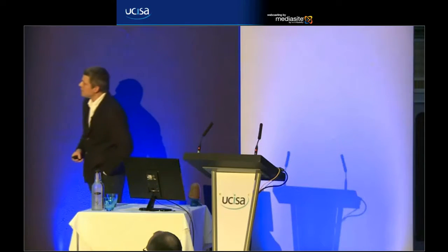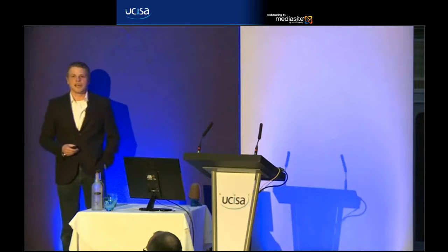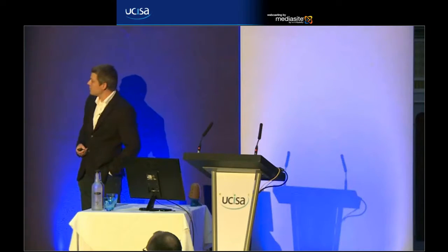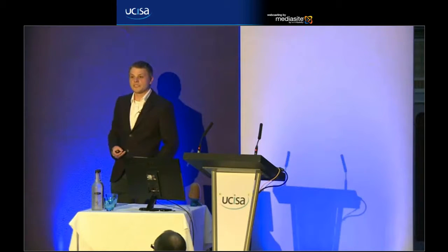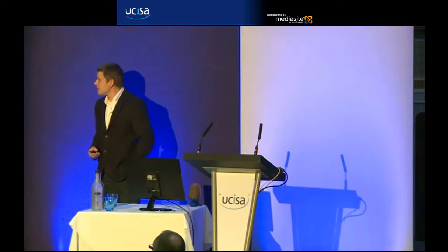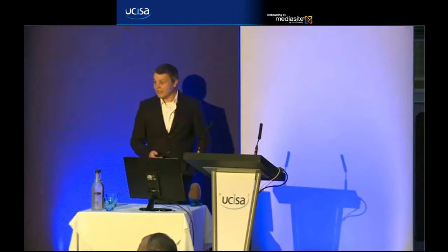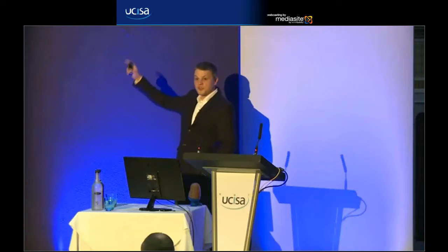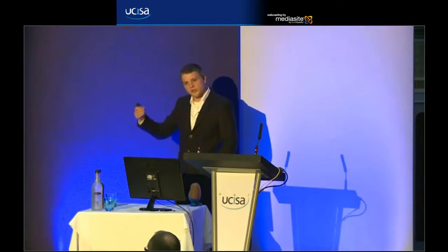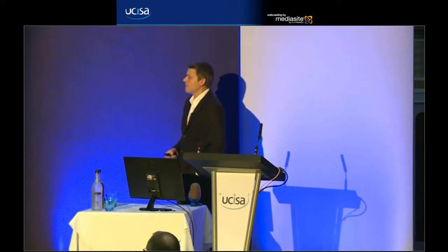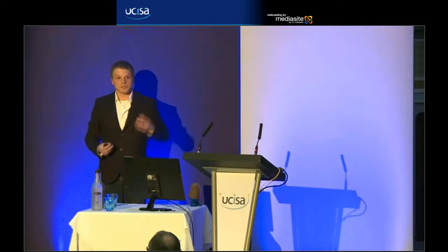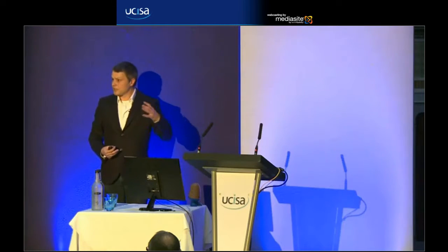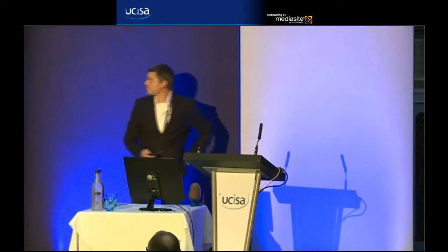So for an example, if we're going to notify new travel requests in an application: as a travel authorizer, if I'm that type of user in the system, I want to receive a new request email when a request comes in so that I know that there are requests waiting. And we go around brainstorming all the requirements from all the different users, and we build up a catalogue of Agile stories that describe, at a very high level, the requirements for the piece of software.